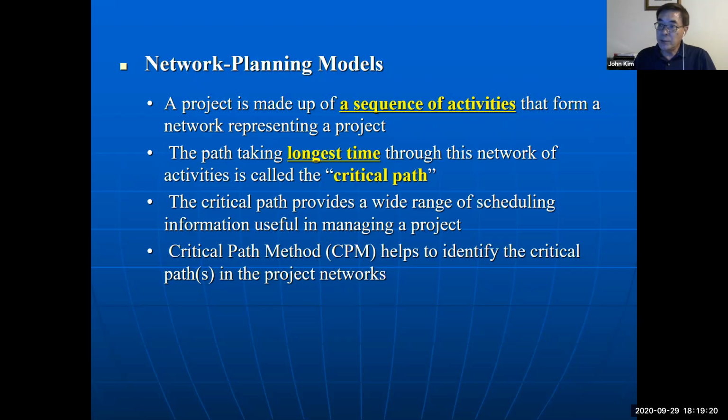And in the video, it says critical path. Critical path means the longest task, like in a line. So manage that critical path. If tasks in a critical path are delayed, then the entire project is delayed. So schedule and plan activities in a critical path carefully. So we use the critical path method for managing project time.